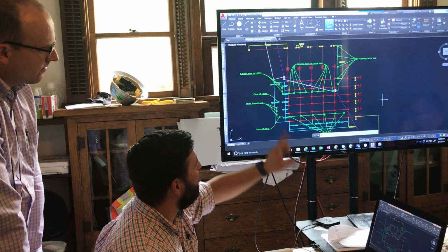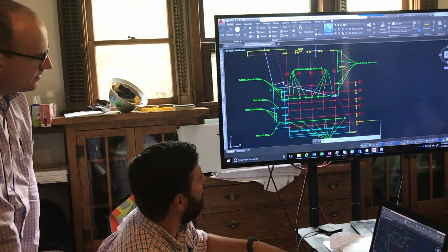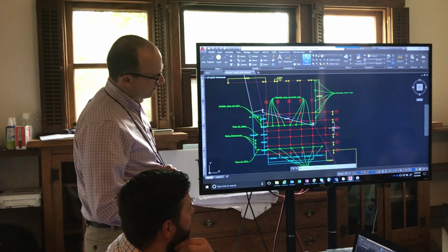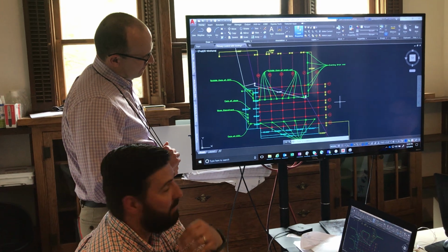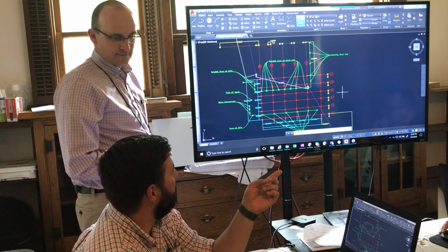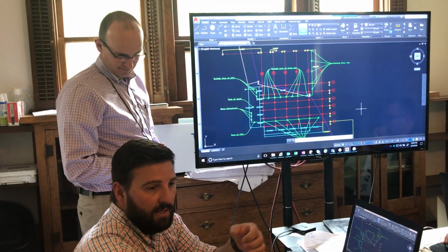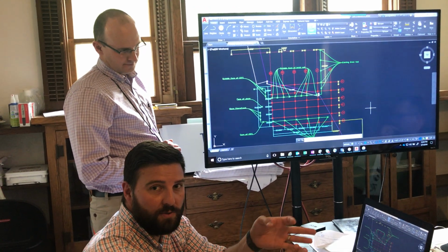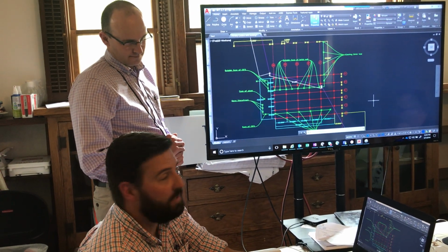And right now, we're in the middle of laying out those yellow points up here, which are our building control points. As we're setting that up, like Jason said, we'll be able to set up a conventional total station without having to bring a robotic on, and just really simply turn 90 degrees and lay out a point, which will help us when we're getting close to putting in our caissons, putting in our anchor bolts, and making sure that we have the correct distances for all those, so that as the structure goes up, we're not having to do any rework or RFIs to change any of that.